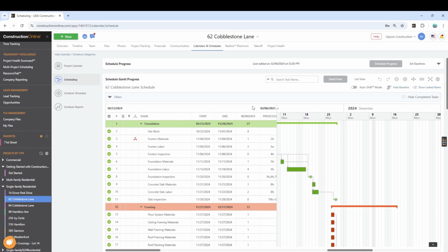Doing the planning also benefits you internally as well. When you are sitting down to put together that project schedule, it really gives you a chance to spot things that might cause trouble down the road that you might not ordinarily see. So things like conflicts with different resources, or even areas where maybe not enough time has been allocated for labor, or not enough money in the budget has been allocated for certain things based on how long it's going to take to complete.